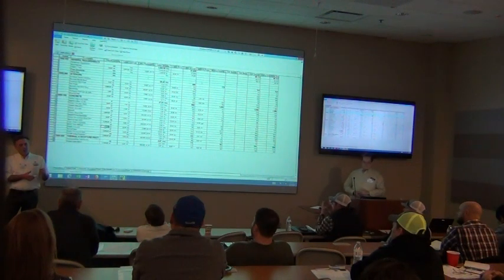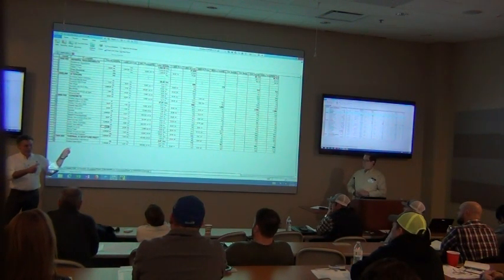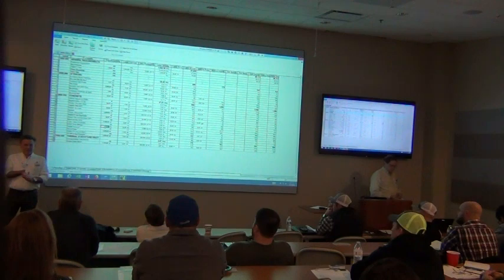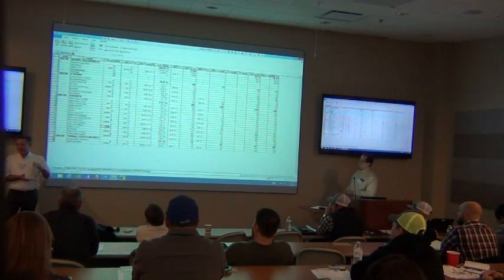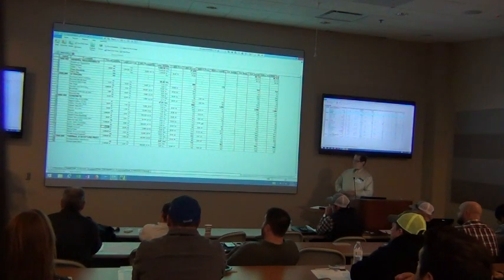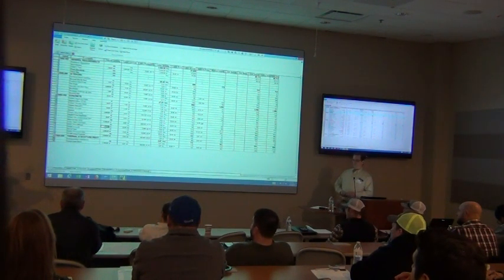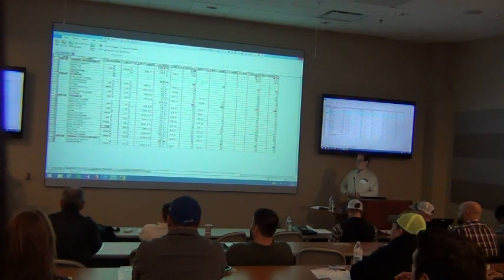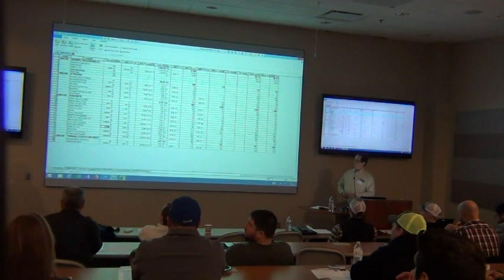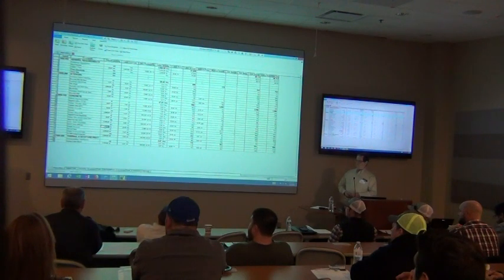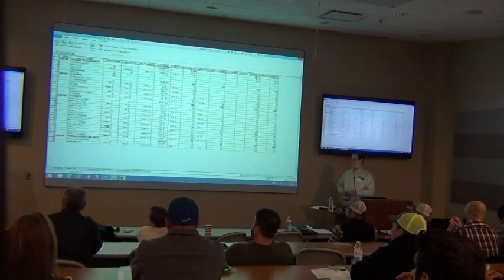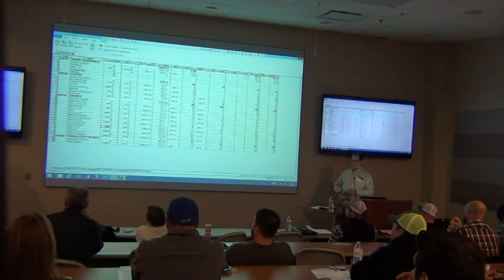One real advantage over Excel is you cannot blow a formula. You can't delete a formula, you can't accidentally overwrite it, you can't do a sum and not catch the entire column. There's a lot of risk in using Excel — the most widely used estimating system out there is Excel, but there's tremendous risk in it. You might forget to change the formula, delete the formula, not catch everything in the columns, overwrite the estimate file, or forget to save it. There's a lot of risk in using Excel.